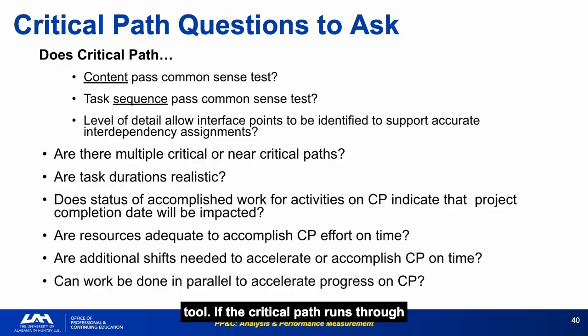If the critical path runs through tasks that experienced engineers would not consider logically dependent, the schedule logic needs review. Multiple critical and near-critical paths increase program risk because a slip on any one of them threatens the end date. Programs with only one critical path have more flexibility. These nine questions are the interview protocol for schedule assessment. Apply them systematically before forming any conclusion about schedule health.